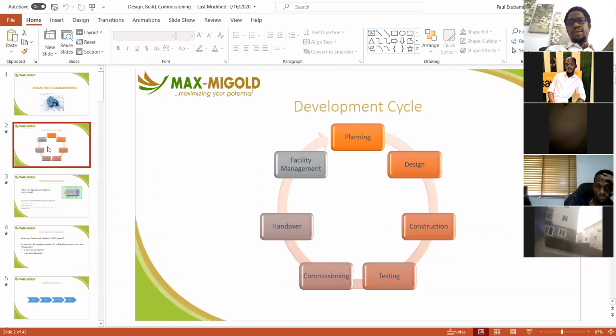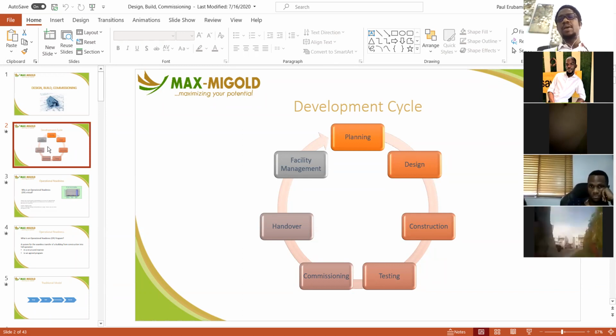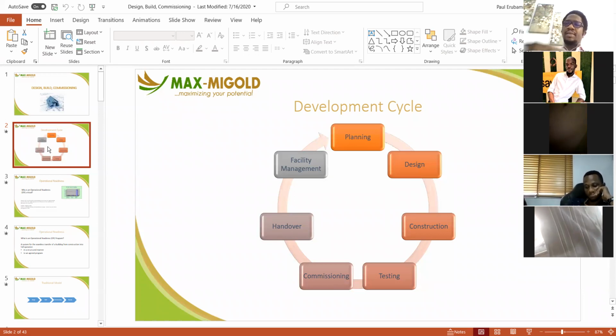They use those drawings to do further work at the design stage to produce a bill of quantities. The bill of quantities is usually produced like this: you've taken the brief, you've turned it into a dimensioned drawing, either two dimensional in CAD or three dimensional in Revit and BIM models, for example. And then someone extracts a bill of quantities. So basically it is these materials, this labor and these efforts that will go into translating these drawings that we see on paper, or this image that we see in the computer, into a real building on the ground. So the bill of quantities is produced.